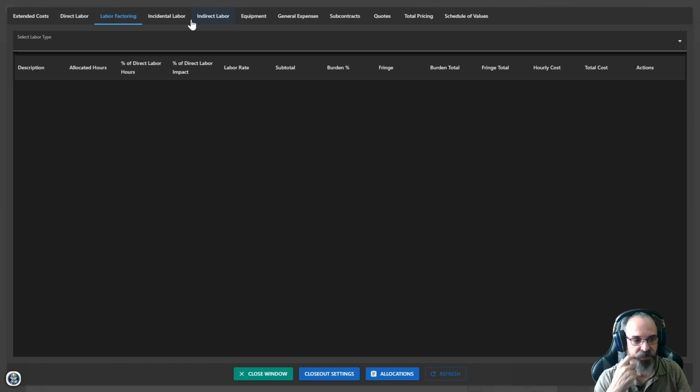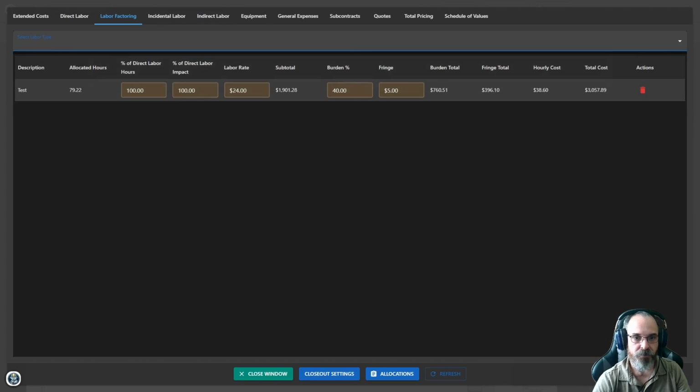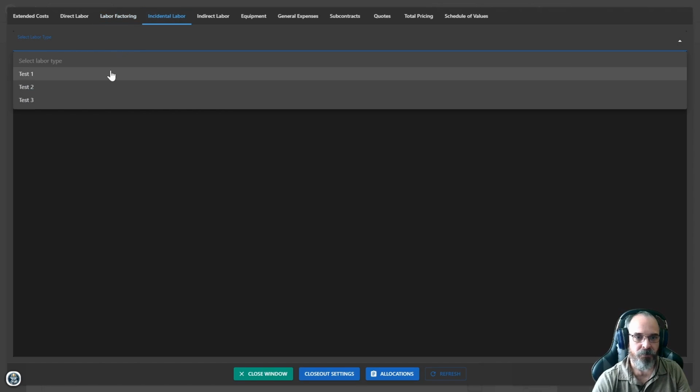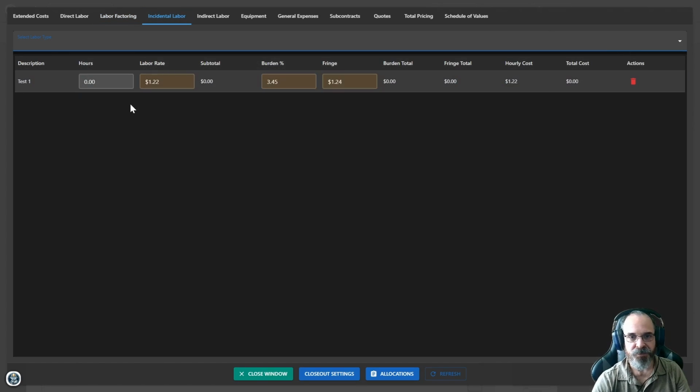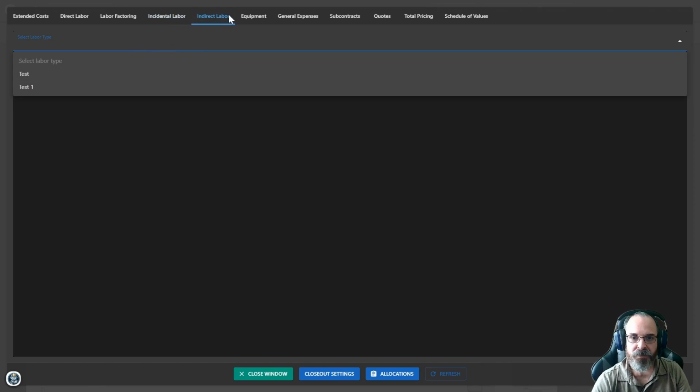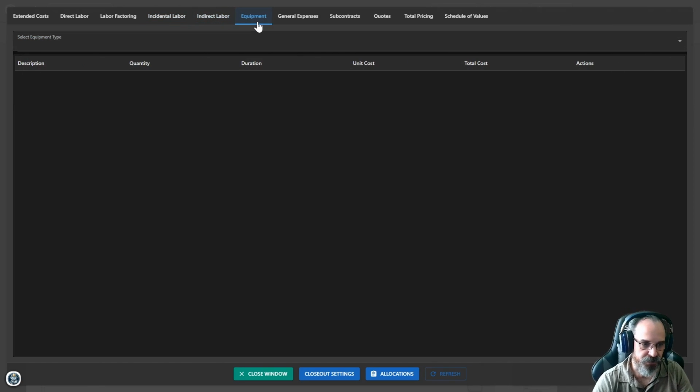Now you don't always have to add a value. The labor factoring is something that you don't have to add, but you could. If there's something about this project that makes you feel like we need more time on this than what my extended costs are telling me, you can go ahead and add that. Incidental labor, I just have some test values in here, but this might be drive time. That's a common one. Indirect labor might be like superintendents, equipment is going to be like your scissor lifts. And you can add as many things as you want to any of these.